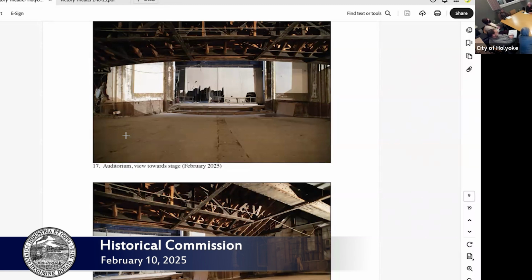And we're now going into construction, what we call the construction phase, in April, with the pointing of the brick on the Chestnut Street side and with the improvement of the Suffolk Street facade. It's all a very delicately choreographed process. And in terms of the finances, the pre-construction that you're just seeing, which gives us the possibility to make it look better, cost about $5.5 million. That work has been done.